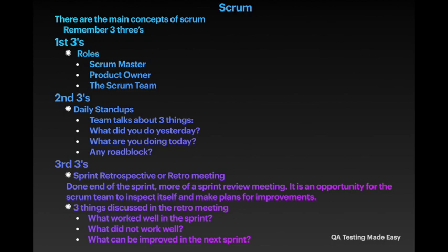the team. Product owner works very closely with the entire team and maintains the product backlog, so you can think of it as the customer's wish list, or another way of thinking of it is as what the customer wants in their product, the features they want, and that is stored in a backlog as user stories. The features the customer wants in their application or software. Product owner clarifies questions related to features and bug fixes, sets the schedule for releasing completed work to customers, and makes the final call. Usually when testers complete testing a story, the product owner verifies it before moving it to stage or prod.